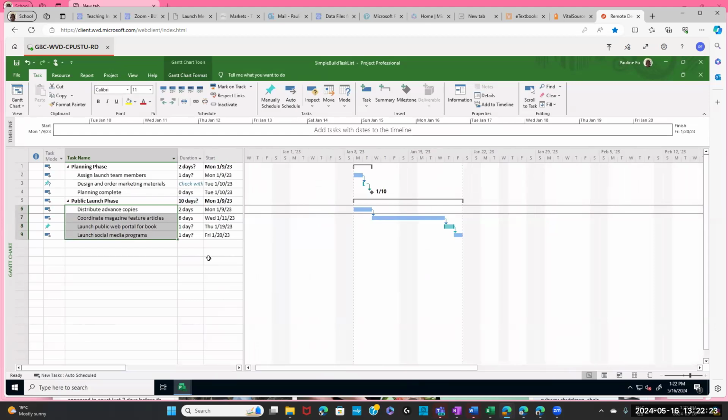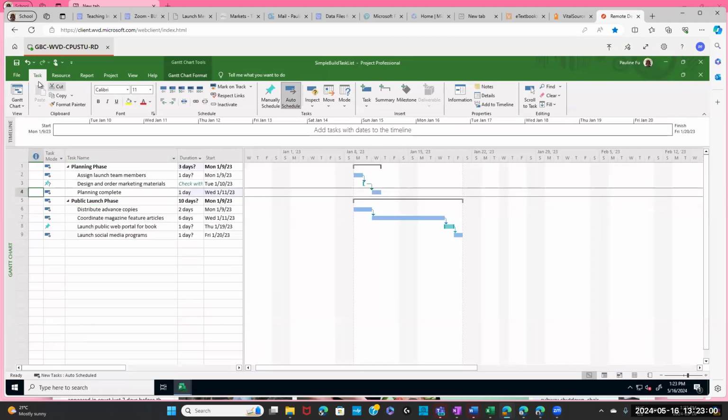So task 4, task 6. First, where is the bar that represents task 4? Remember task 4 is the milestone. A milestone in the graph uses a diamond. The diamond is the task 4 milestone. And then task 6 is this bar here. So what you do, click this milestone, click and drop it. Oops, I should undo it.